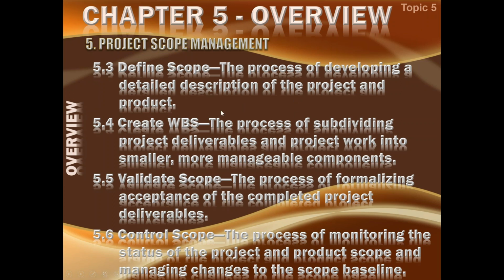Based on the requirements, we first develop the product scope, and once the product scope has been established, then we define the project scope. Product scope means what all features and functions are to be present in the product. And project scope means what all work is to be done to create the product with those predefined functions and features. So we'll talk more about it.